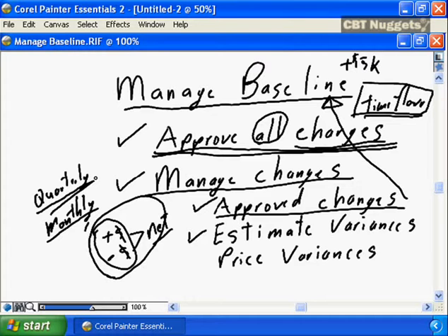Or are we going to change the timeline, if that is appropriate for adjusting the variance, saying I no longer have to pay overtime, or I can bring in less expensive staff and do the same work over more time? But what are you going to do about your estimate variances once you have accumulated all the pluses and minuses and have a more realistic understanding of what the new project costs are going to be? And the same basically applies for price variances.